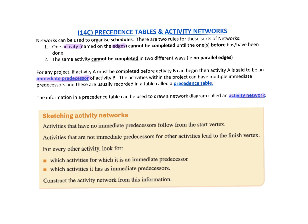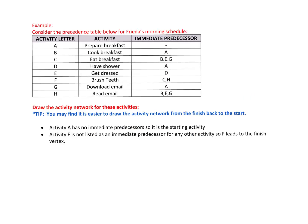When sketching activity networks, activities that have no immediate predecessors follow from the start vertex. For example, getting the bread is the start, and putting it in the toaster is the first activity. Activities that are not immediate predecessors for others lead into the finish vertex. For every other activity, look for what their immediate predecessors are and then construct the network accordingly.